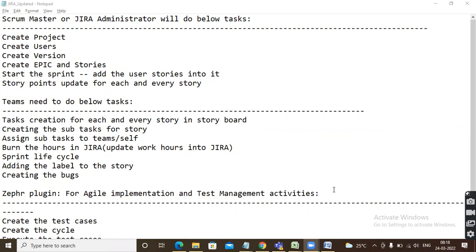If we are able to complete it in 1 week, then they're going to make that sprint 1 week and we are releasing something. Otherwise, usually 2 weeks is the sprint duration, and whatever we want to deliver, we can deliver in those 2 weeks. That is completely decided by the product owner and Scrum Master. Okay. Yeah. So that's fine.